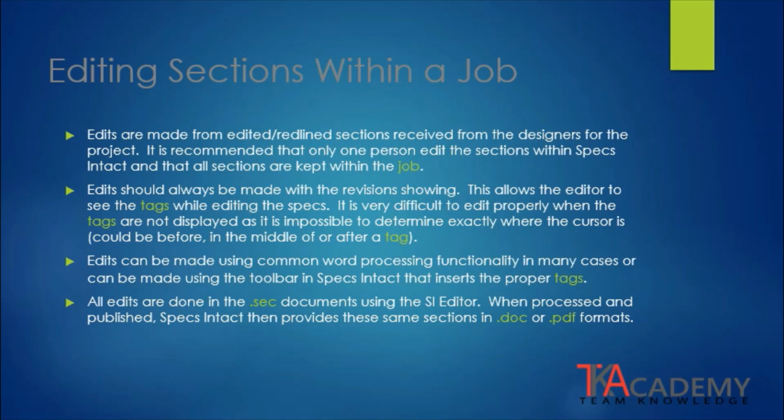Edits to the technical specifications should always be performed by the designers of record for the project. However, it is also recommended that only one person edit the sections within Specs and TAC, and that all sections are kept within the job. Best practice is to provide a printed or electronic version of the unedited template specs to each of the designers for markup. The designers make the revisions to the unedited template by marking up the document, and then providing that marked up document to the specification editor for those changes to be implemented within Specs and TAC.